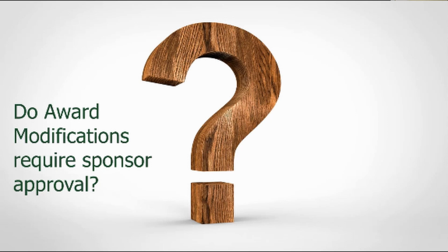I know which award you're talking about, Emily, and in this particular case it would need to be Pueblo that would reach out to their program officer, and then we would deal directly with Pueblo. Our sponsors do not want to deal with our subs. The contracting and the awarding is between the pass-through entity and that sub-award, not the prime and that sub-award. Contractually, if we are a sub, we don't have the authority to go around our pass-through entity and go directly to the prime funder. So we need to be very careful with that.